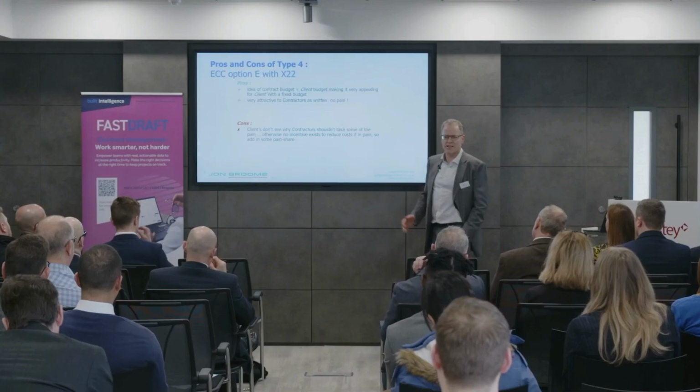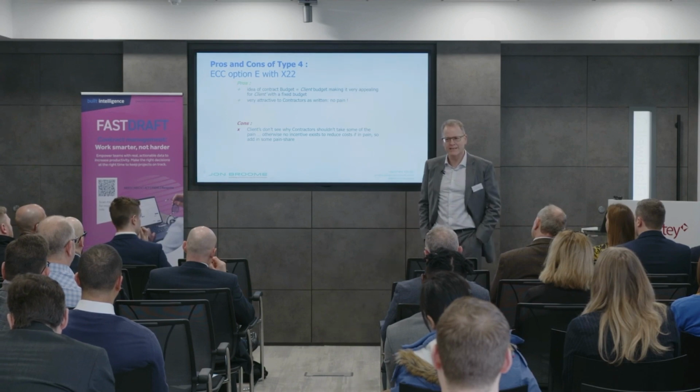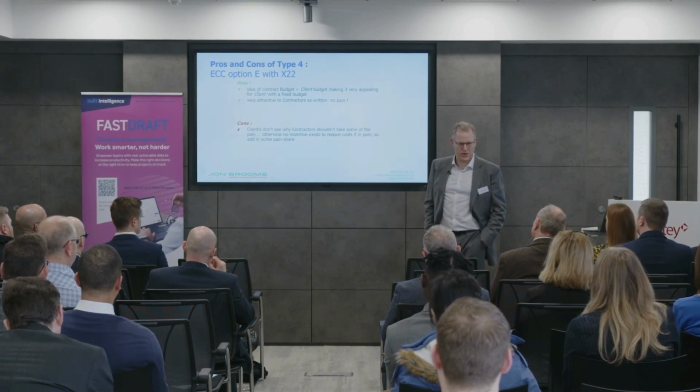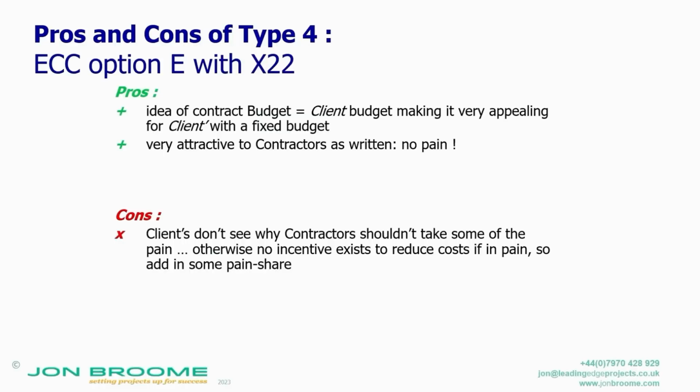But then clients go, but hang on, I don't see why contractors should only have gain. Because when I'm in a stuck position, I actually want them to have a motivation to carry on helping me out rather than just go, I'm out of here. No, I'm carrying on getting cost plus fee, so the more it overruns, the more profit I'm actually making. So they want to introduce some pain.